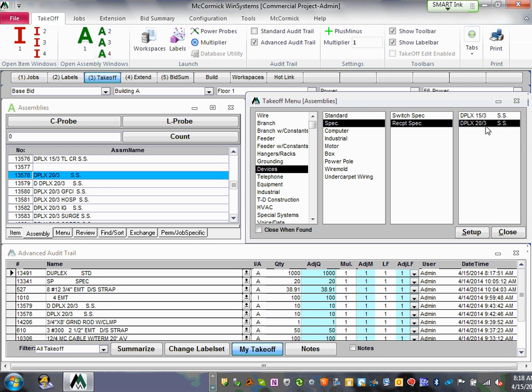Thumbs up, Chad. We know how to do that. And what I suggest is not to even use the counter, guys, for them. Use colors, Adam. Color them, and then count them. And then stick them in right here. Based on, here's, for example, a duplex 20 amp receptacle. And you stick how many of them you have. I'm going to say 10. Hit enter. Done. These are receptacles. Pay attention to whether they are duplex, double duplex, GFCI.